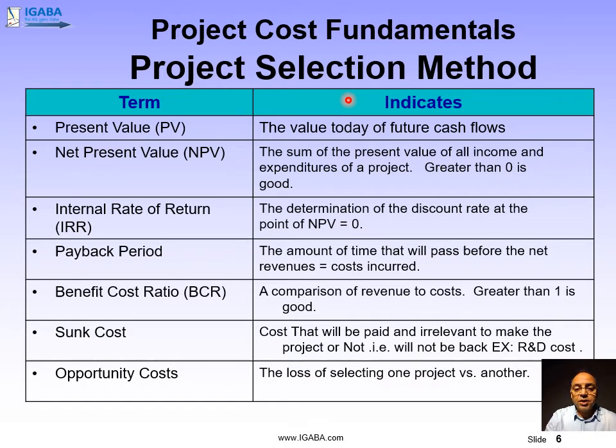The general formula is that present value equals future value divided by (1 plus r) to the power of n. Now, r is the inflation rate, and n is the number of years, generally speaking. There's more detail to that. Some finance departments and organizations will dictate a certain r, and they will call it a discount rate,